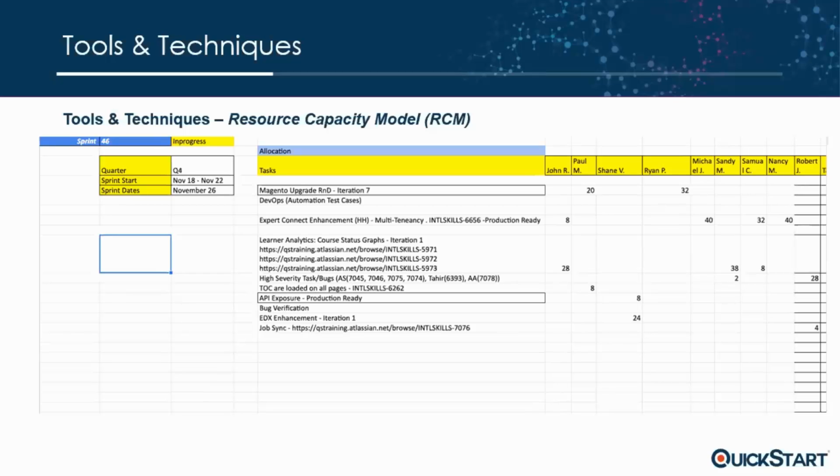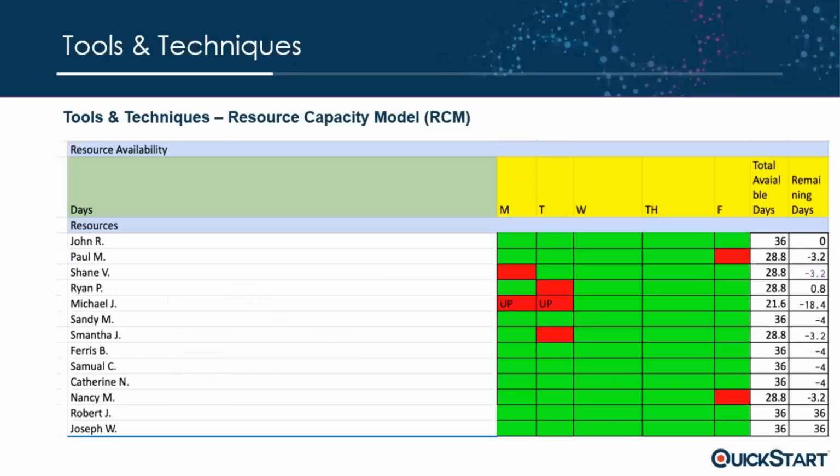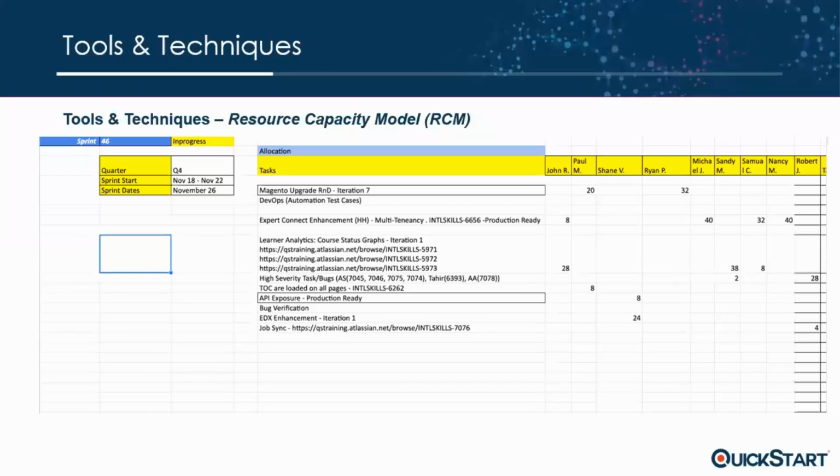I'm going to refer back to that book, The Phoenix Project. It's a very good book and talks about some of these scenarios. So if you do a 2 hour task on a specific day and you don't register it, but your hours are allocated at 40 hours a week, for example, then your 2 hours are gone. And maybe 1 or 2 hours more later in the week, you are probably doing something else. Now your 4 hours are gone, but you were allocated 40 hours, or maybe 36 hours depending on the contingency, so it would have an impact.